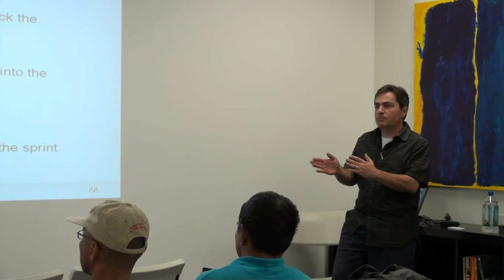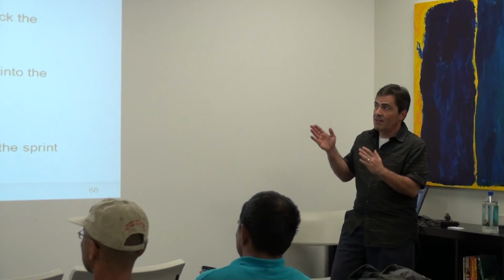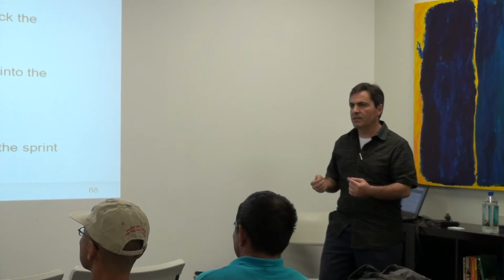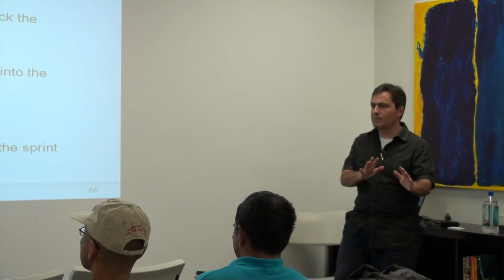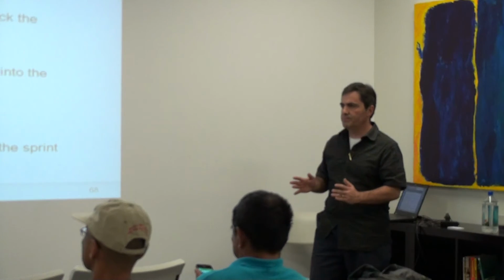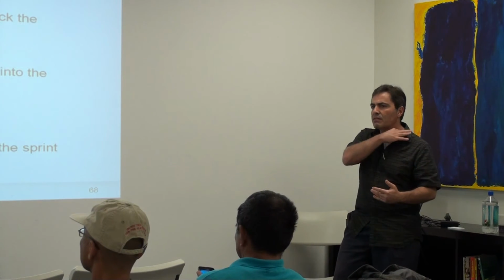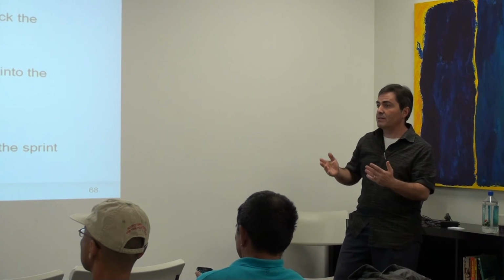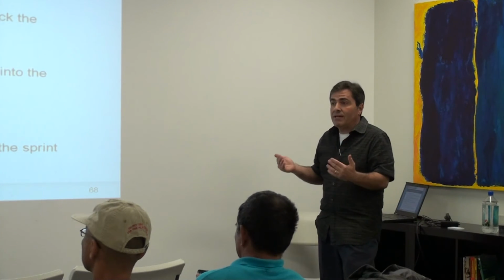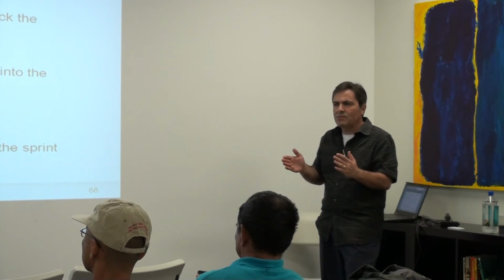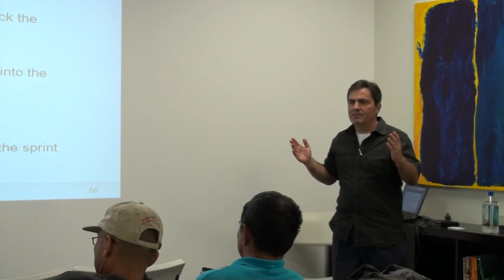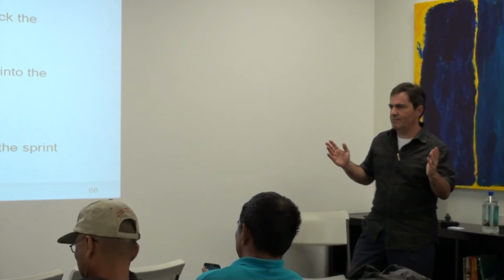So this is what you give your product manager or your product owner and say, okay, when the user story meets these criteria, we're ready to now work on it. Otherwise, it's not ready. It stays in the backlog. We can talk about it, but we're not going to commit to it. That would eliminate a lot of the failure patterns that exist today in Agile teams. A lot of times teams take on user stories, they're not even quite sure what it is or how to demo it, and they spend three or four days just talking about it. Well, that's half your time box shot.